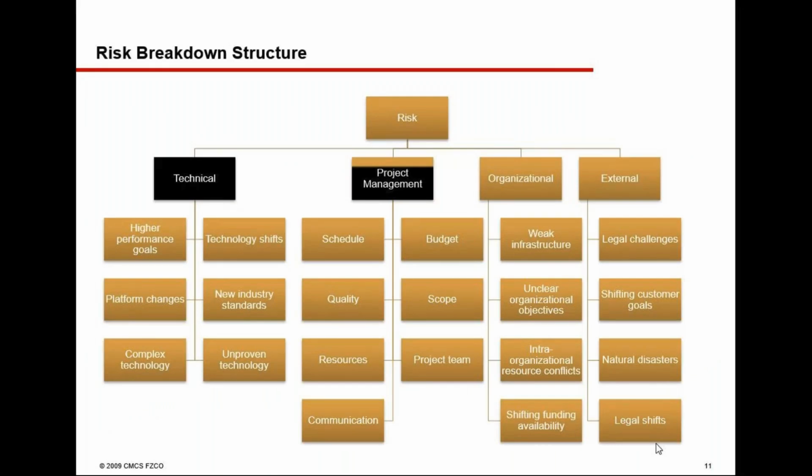How do people do risk management when using Primavera Risk Analysis or Oracle Primavera Cloud? You have something called a risk breakdown structure, similar to your work breakdown structure. At the top level you have the risk organization level, then the various categories by which we are classifying the risk.